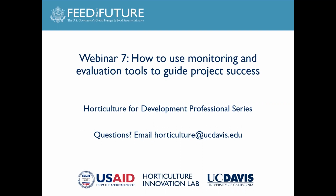Well, why don't we tackle that in two different ways, actually? I have been part of programs that did not collect baseline data starting off, and that can happen for a variety of reasons. Sometimes it takes a while for the program to really start up. And baseline data collection, as I did mention during the webinar, is best done early and best planned, but sometimes things don't go as planned. I would say that a baseline is absolutely important at any stage. If it hasn't been conducted in the first year, do it in the second year, to really make sure to ground, because otherwise your MEL plan is sort of floating in space. There's nothing to ground your beginning and your starting point. So I just want to say that bit.